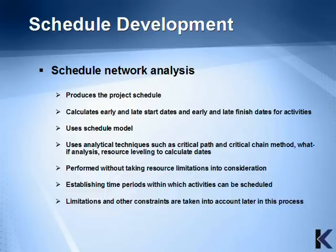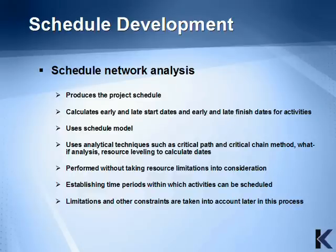The schedule network analysis produces the project schedule. It calculates early and late start dates and early and late finish dates for activities. It uses the schedule model and analytical techniques such as critical path, critical chain method, what-if analysis, and resource leveling to calculate the dates. It is performed without taking resource limitations into consideration, and it establishes time periods within which activities can be scheduled.